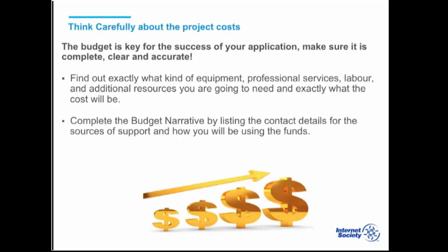Okay, the other important thing about the application is the budget. So think carefully about the project costs. Before you fill in the budget online, list all the needs of the project: labor costs, travel, project management, equipment, room for the project. All these needs to be listed so that at the end you come up with a project budget. So it's important to do that.